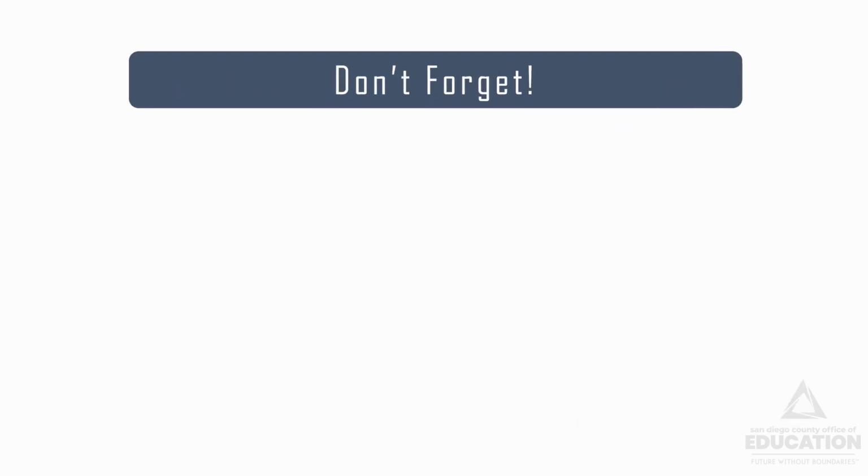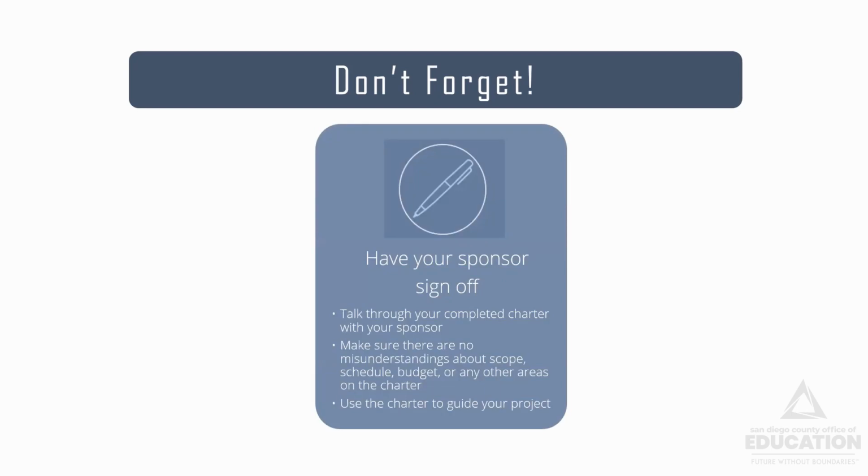Now that you have a completed project charter, don't forget to have your sponsor sign off on it. Sit down and talk through the completed charter with them. Make sure that there are no misunderstandings about scope, schedule, budget, or anything else on the charter. This will probably save you headaches down the road. Once you have the sign off, use this charter to guide your project.